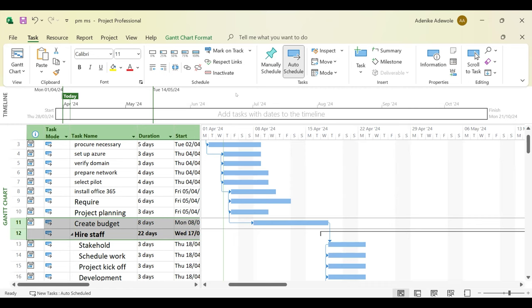It's okay. Thank you. I'm surprised you're saying that it's not aggregating. It should aggregate everything to sum up to what you have on the summary task. But what it will not do for you is this: task A is 5 days and task B is 3 days. If you're saying it's finish to start, automatically the summary task will be 8 days, because it's 5 plus 3.